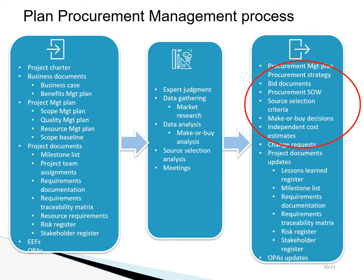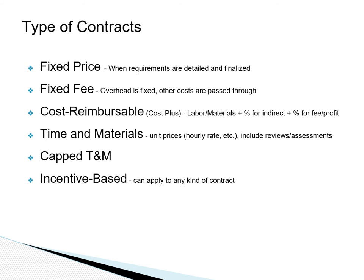In the planning stage, we use project documents such as the resource requirements document that identifies resources required for the project. We then determine whether it makes sense to make the resource or buy the resource. If we decide to buy it, then we need to research the marketplace and determine what sources are available for acquiring that resource. After we identify the resources we need to acquire, we need to decide what is the appropriate type of contract for acquiring those resources.